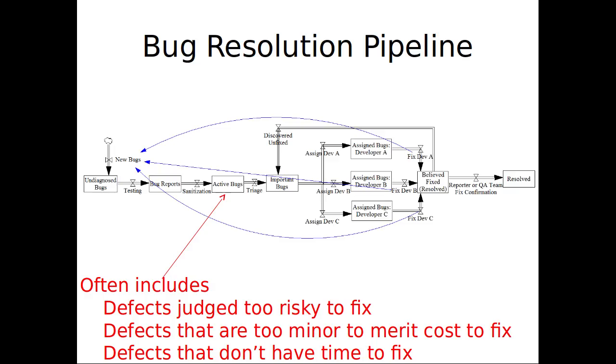So attempting to fix this might in fact introduce other defects, because it's a delicate enough area of the code base. You spend a lot of time getting it just right, eliminating some final bugs, getting it in balance so that it actually works, and now you're going to go in and tinker with it when the deliverable is tomorrow? I don't think this sounds like a good idea. This might be a fairly modest bug, but we might introduce one that's really obvious. We'll do the demo in front of the client, and we'll have egg all over our faces.